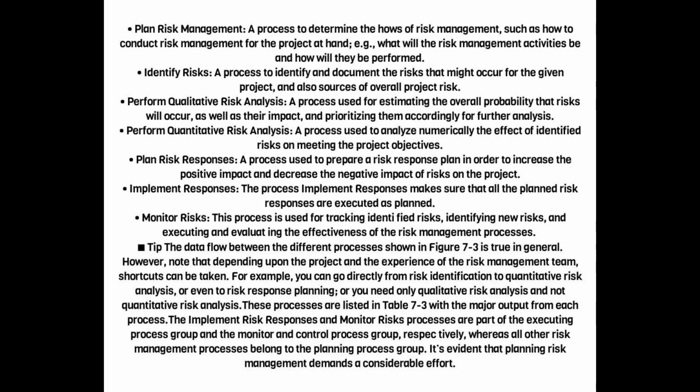Perform quantitative risk analysis, a process used to analyze numerically the effect of identified risks on meeting the project objectives. Plan risk responses, a process used to prepare a risk response plan in order to increase the positive impact and decrease the negative impact of risks on the project. Implement responses, the process that makes sure that all the planned risk responses are executed as planned. Monitor risks, this process is used for tracking identified risks, identifying new risks, and executing and evaluating the effectiveness of